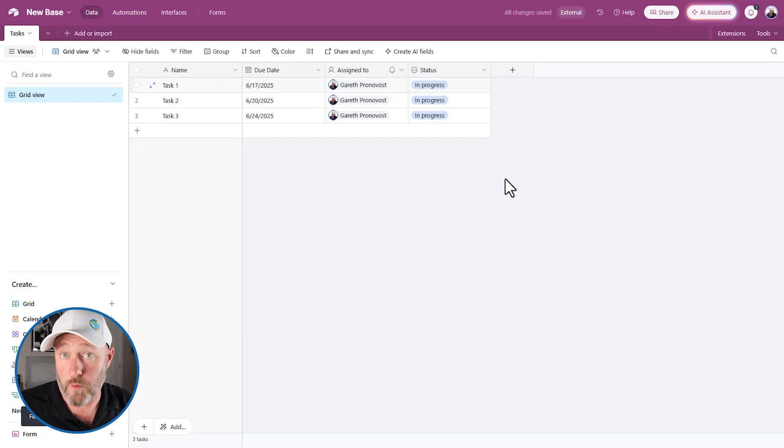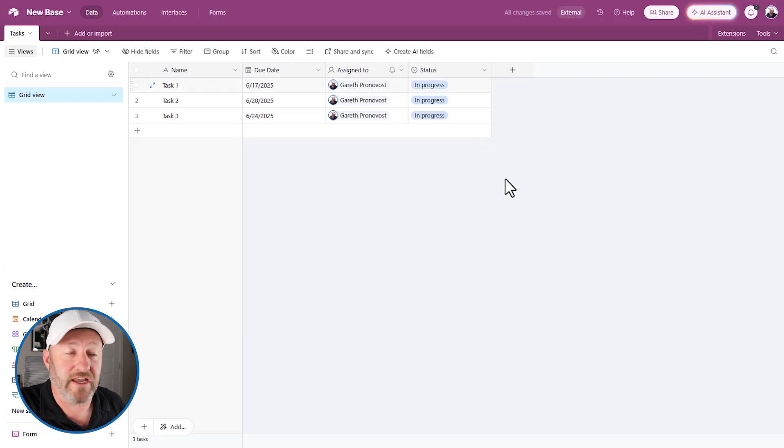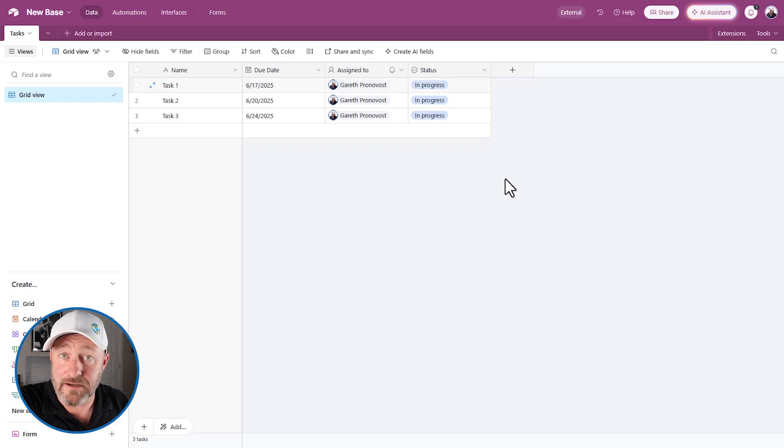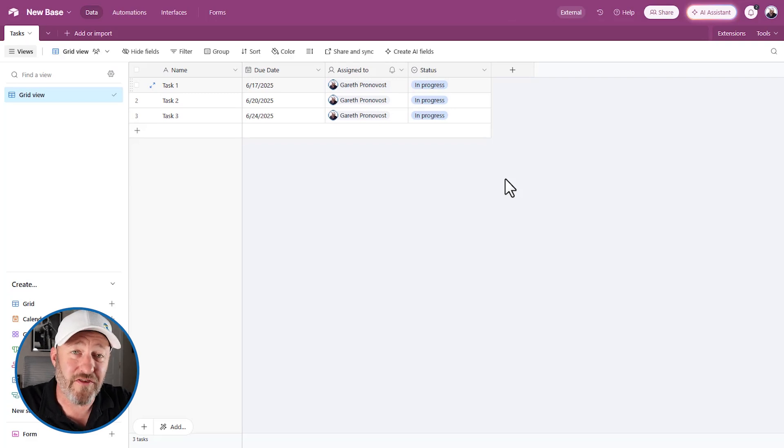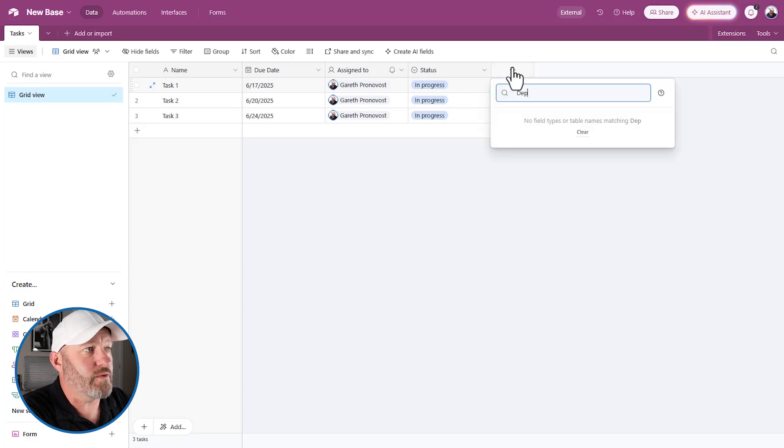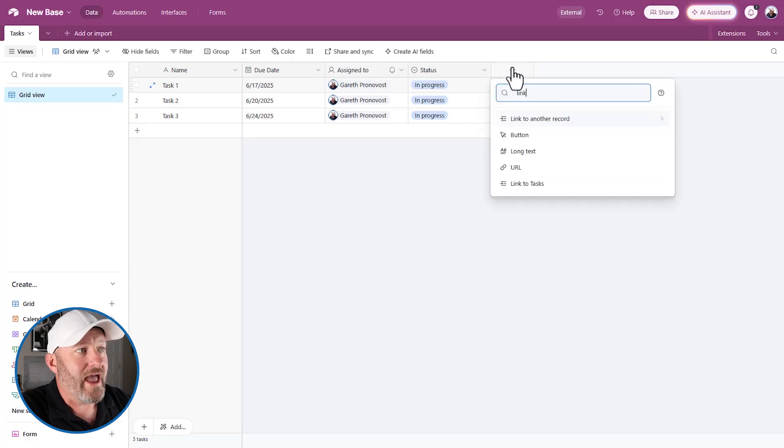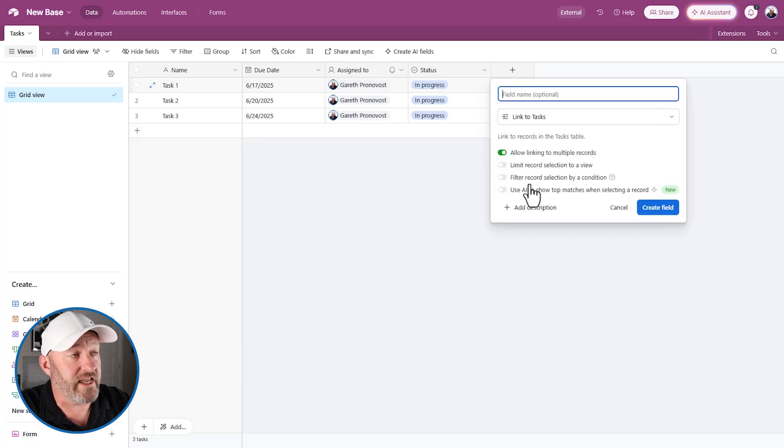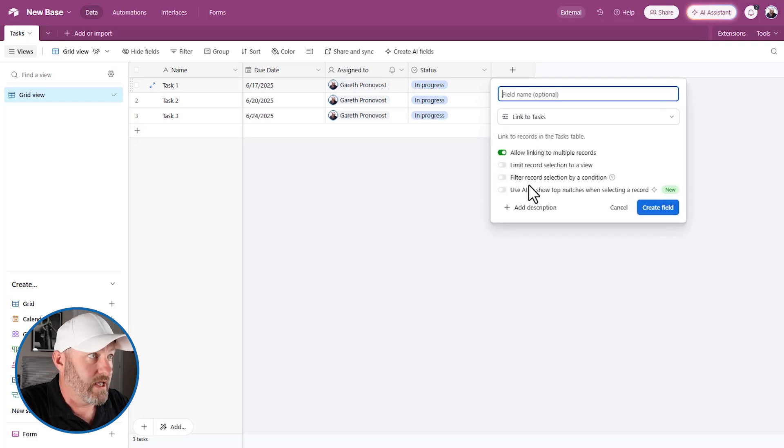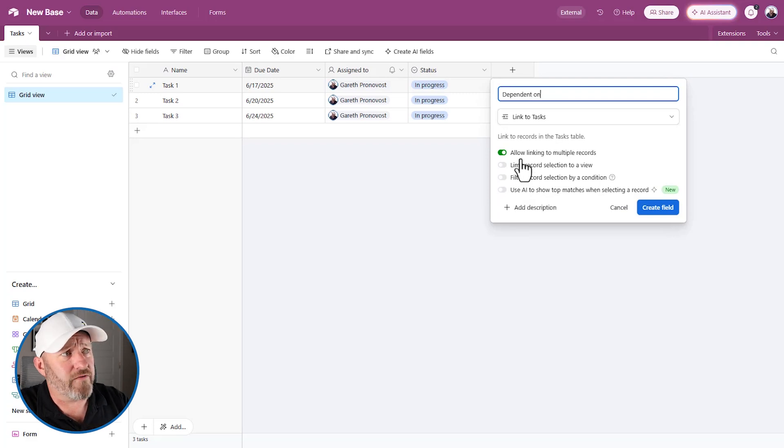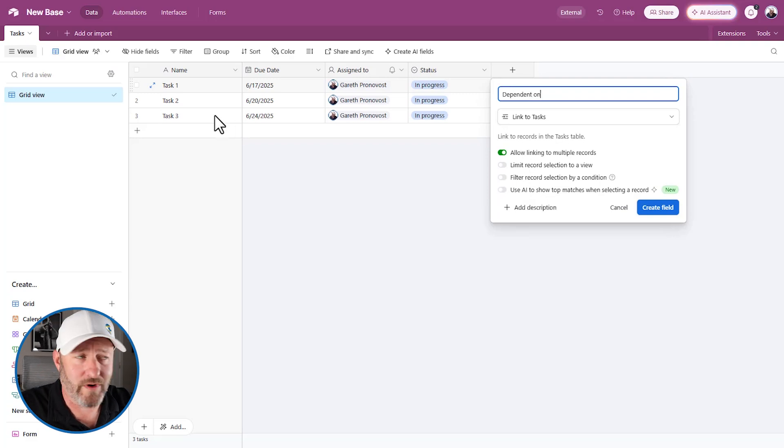Now it's been possible for a while that we could self-link to a table. So when you have things like tasks in particular, it's a common thing to want to self-link because you might have dependencies. So you would say something like dependent on. And in order to present this, you're going to self-link to the tasks table. And so I'll name this dependent on.